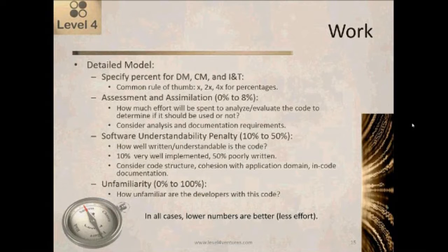So let's say that somebody's talking about 3 reports and 2 pages, I'm just trying to figure out, are these going to be modified? Are these complex? Or, that type of thing. Let's say somebody's talking about, well, we're going to write 300 new pages. Well, now I'm thinking, okay, I'm going to have to get into the design, into the detail model. And so I'm trying to understand better what's their approach, what settings do I want to use for SU, for UNF, unfamiliarity, et cetera.